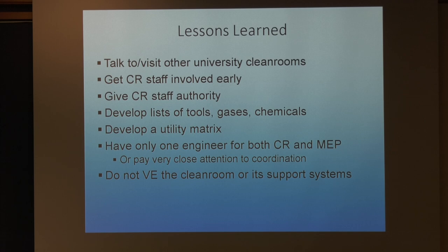And Dennis used the word rash. I think I was something worse at times. But I knew I had a mission. I know that my researchers wanted a nanofab cleanroom, and that's why I tried very hard to deliver. Make sure you have a list of tools, gases, chemicals, have a tool layout, have a utility matrix. If possible, hire the same engineer for both cleanroom design and MEP. If not, pay very close attention to coordination.